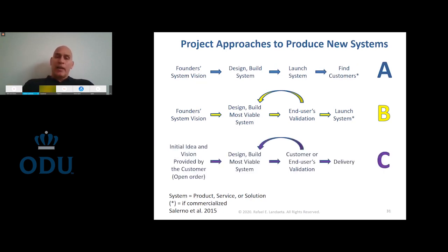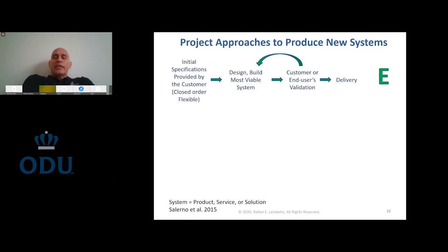The next one is when the customer comes with an idea, but it's not quite well-defined, and wants somebody to help solve it. So the customer and the project team together define what they're going to produce. And they go through the same type of iteration. They build a minimum viable product and then iterate until it's ready and then deliver to the customer. And next one, approach E,